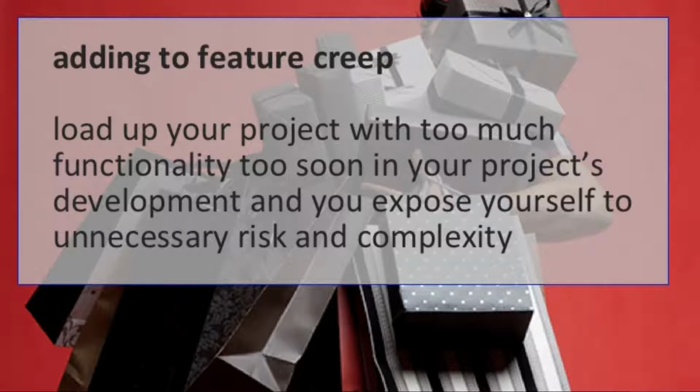And then when you get to the point where you're starting to build out features, always make sure that you're keeping an eye on that original content structure that you had. And if somebody wants to add a new feature, do you have the content for it? Is the content driving that feature? Or is the feature just some bell and whistle that you saw someplace and you need to add to the site somewhere, but you don't have the content for it, and the feature is not solving a problem? That's what site features really should do. When it comes to design, when it comes to functionality, they should really be solving a content problem. How do you present this information in a way that's easily consumed by your users? If you're adding a feature that doesn't do that, then forget about it. And that's what's adding to feature creep.